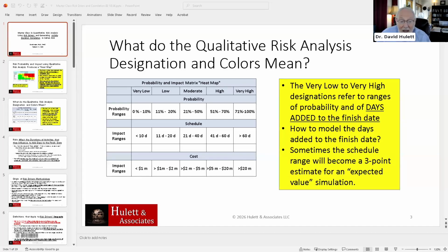And again, they don't know whether it will happen. They are making an assumption that if the risk happens, and then they jump to the final result, and they say, okay, if that's the case, then we're going to have a 60-day or a 40-day or a 20-day impact, and they just don't know that. So what we have to do is to wait until we've gotten the quantitative risk analysis completed, and then try to look and see which ones are the most important risks there.